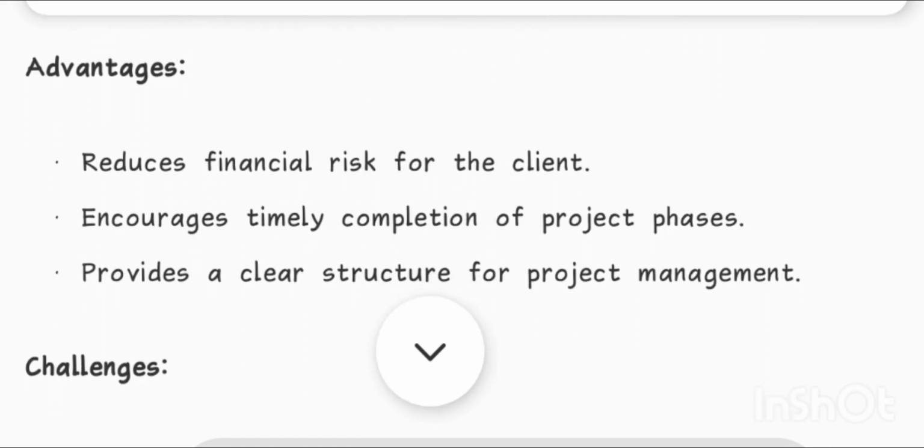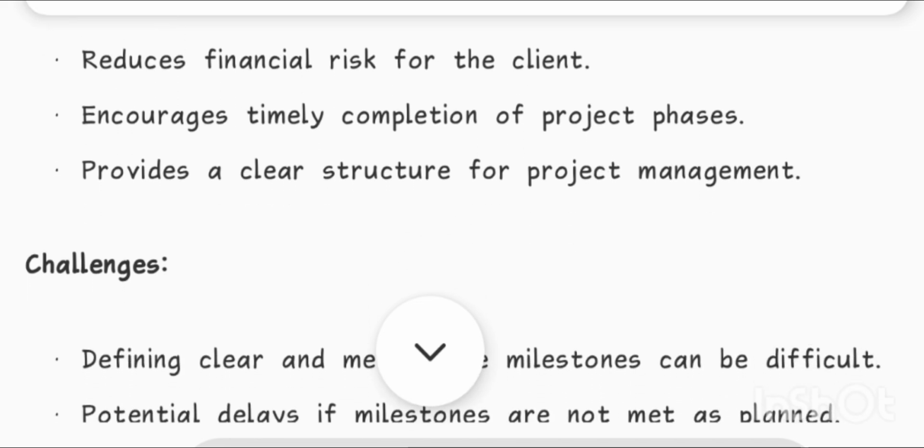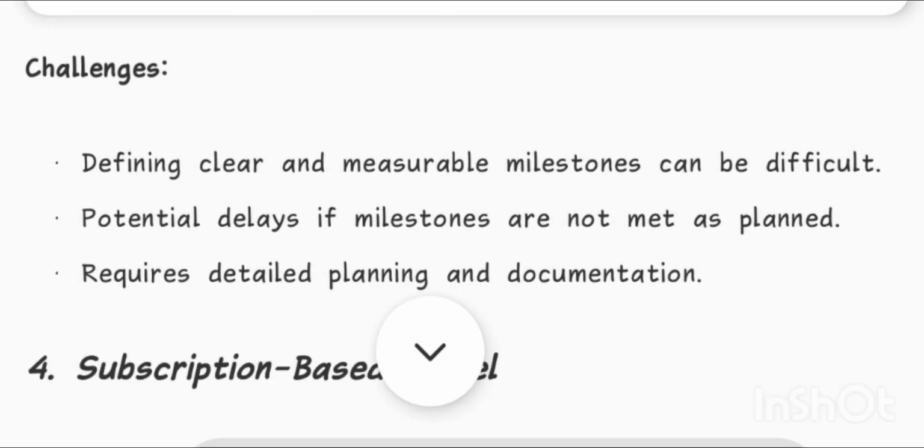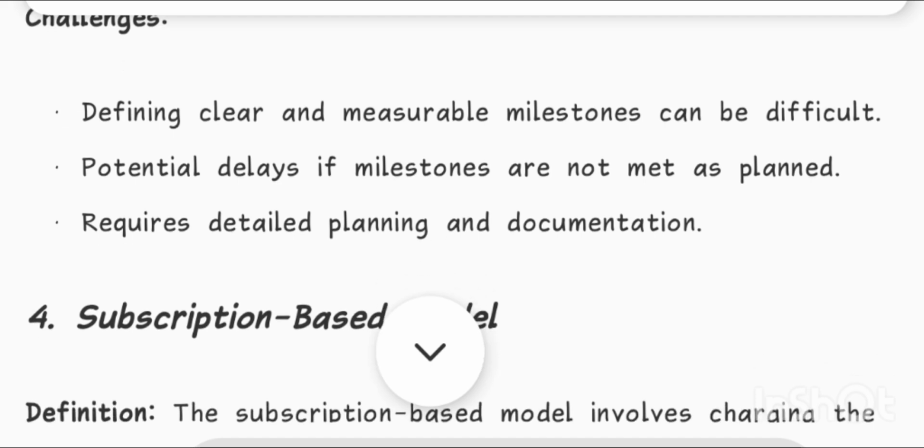Advantages: reduces financial risk for the client, encourages timely completion of project phases, provides a clear structure for project management. Challenges: defining clear and measurable milestones can be difficult. Potential delays if milestones are not met as planned, requires detailed planning and documentation.